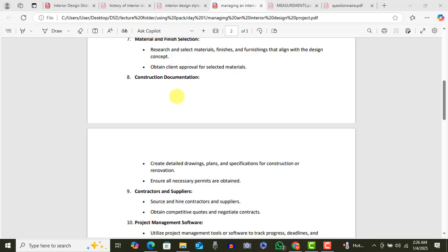So it is up to you as an interior designer to know that this is not my field. They are adding something to me where there's no washroom. Exactly. So you should be able to know that this is actually not my field. They are asking me to do it, but I want to take on the project. So let me subcontract this thing that is venturing into construction to a construction expert. Let them do it, and then I do my decoration or designing. That is what I'm saying, making sense. Yes.